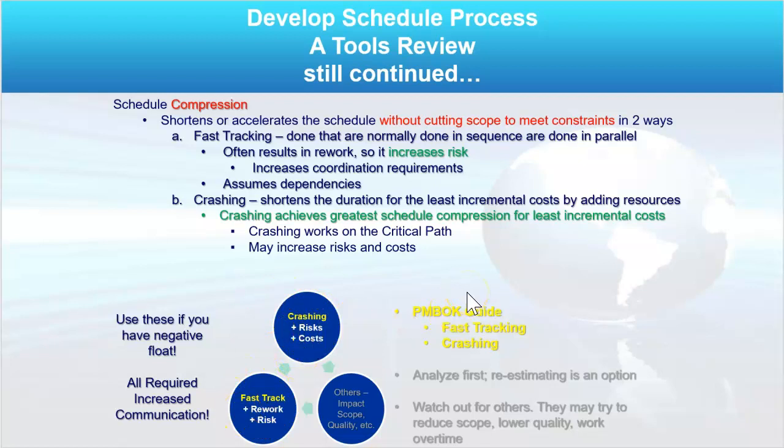There are other things to watch out for, right? Others, especially a vendor, may try to cut scope or quality to speed up the schedule. You want to watch out for that as a project manager. But the formal power you have is to crash or fast track the schedule.